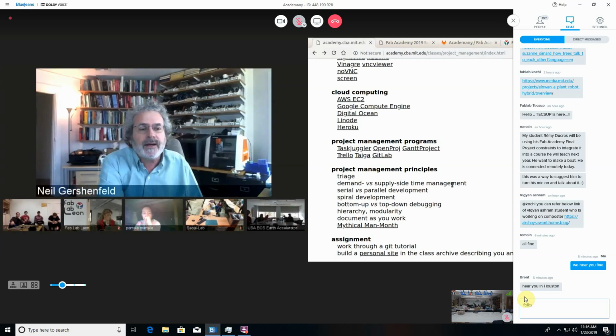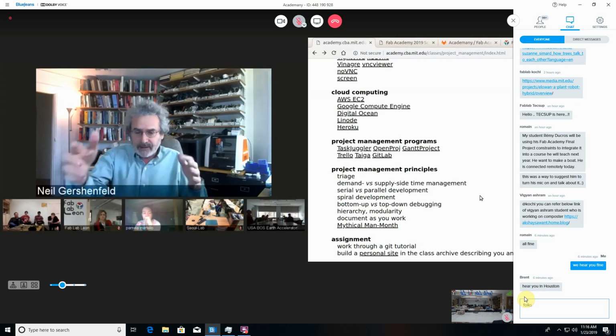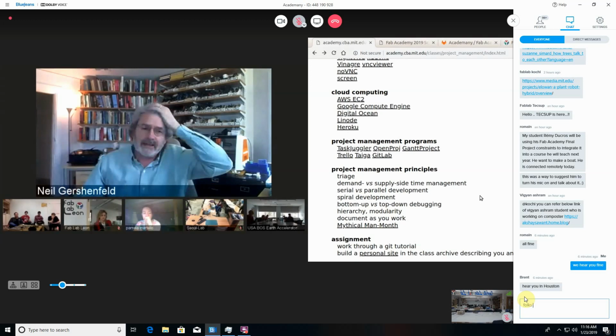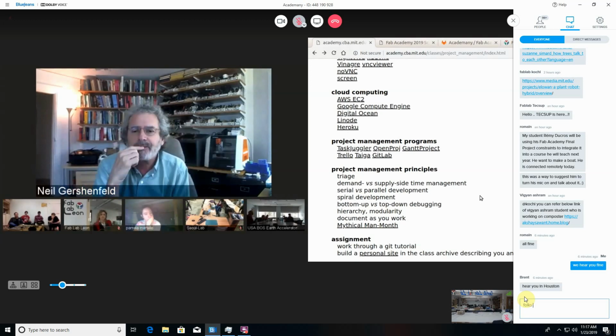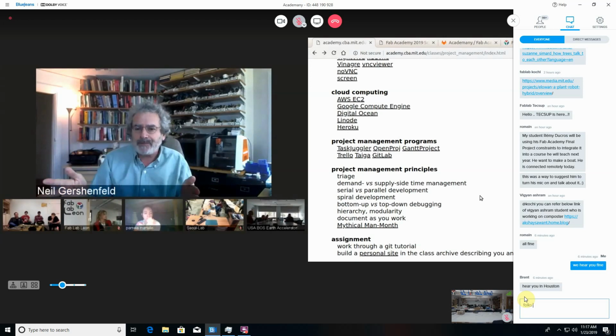A really important skill in the class is the difference between demand and supply side time management. Demand time management is you work on a task for the time that it takes. And that sounds obvious, but it fails. Because you have a series of tasks to finish your project, but if each task takes more time than you have available, you fall off the end. So supply side is a very different way of working. In supply side, you decide how much time you have available, and then you decide what you're going to do in that time, and you work to the schedule.